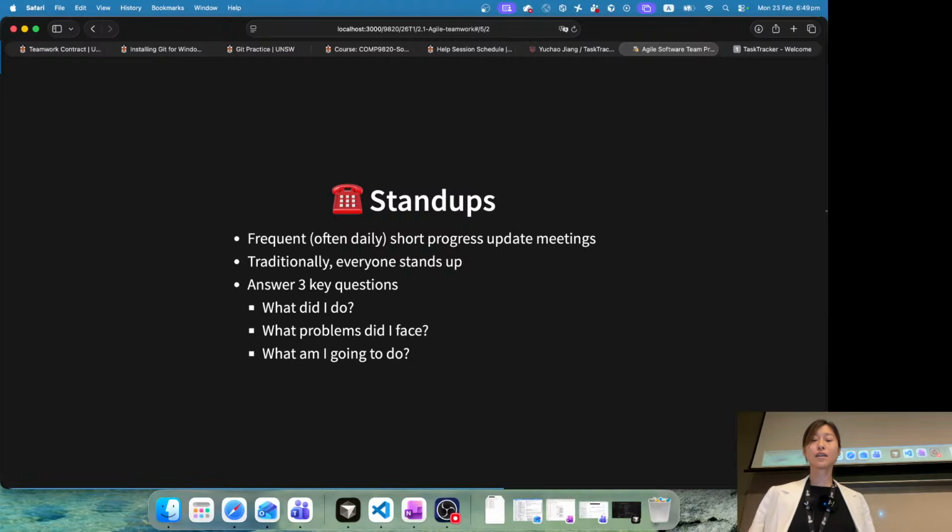Another great starting point for Agile is called stand-ups. So what is a stand-up? Stand-up means frequent, often daily, short progress update meetings. Does it have to be real meetings? No. Meetings are very time consuming and you need to make sure that everyone has time at that specific time every day. That's so hard. But it is the case in traditional software teams. In the morning, 10 a.m., everyone sits in the meeting room and talks about what you did yesterday, how's your progress, and share things. So this is the traditional way.